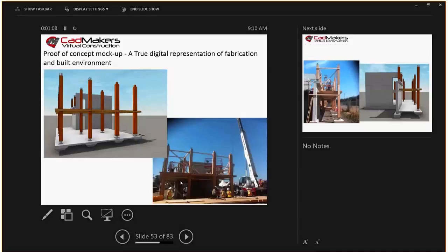I'm just going to fly through this. This mock-up was the first time we were able to test: are we really going to be able to build the structure as fast as we hope? There's a premium on the materials. Mass timber is a little bit more expensive than concrete for an 18-story building, but if we can make it up on speed, overall net, it's a strong pro forma for the owner.